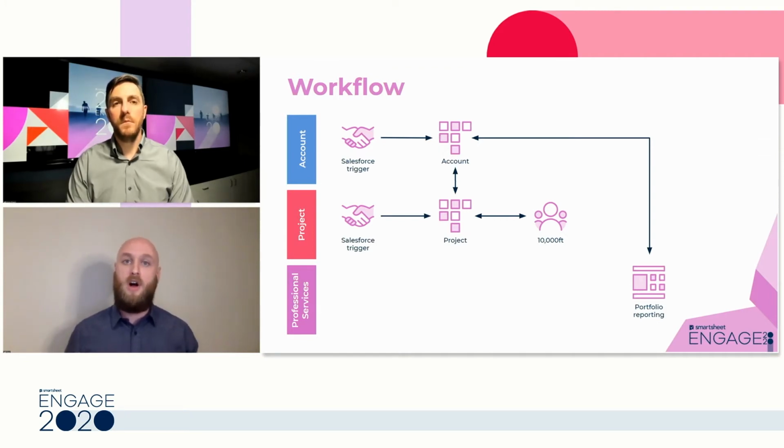For us, we call the PMs our CEO of our projects, and they're ultimately responsible for everything that happens from the time of assignment till the time we're done with that project. So it's important for us up front to make sure we start with the most appropriate resource, and that's why we really have this manual intervention in the first step of our solution. So basically, we get information from Salesforce, and we're looking at size of account, what segment, what region, and some other data points to ultimately determine what type of resource we need to assign.